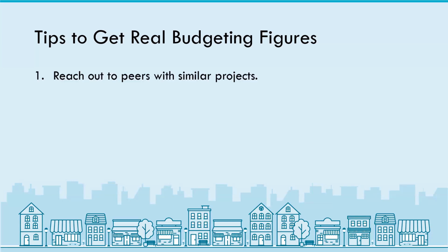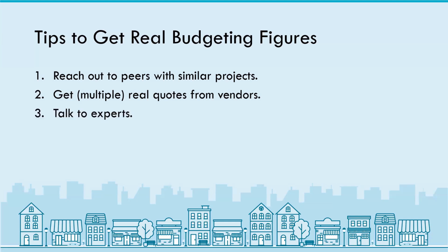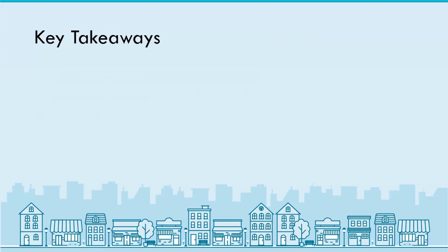First, reach out to your peers. Ask your peers what they've spent on similar projects. Get real quotes: reach out to vendors, consultants, and service providers, and get price estimates from multiple vendors. And talk to experts. If you're hiring a marketing firm or a contractor or event planner, ask them what's realistic.